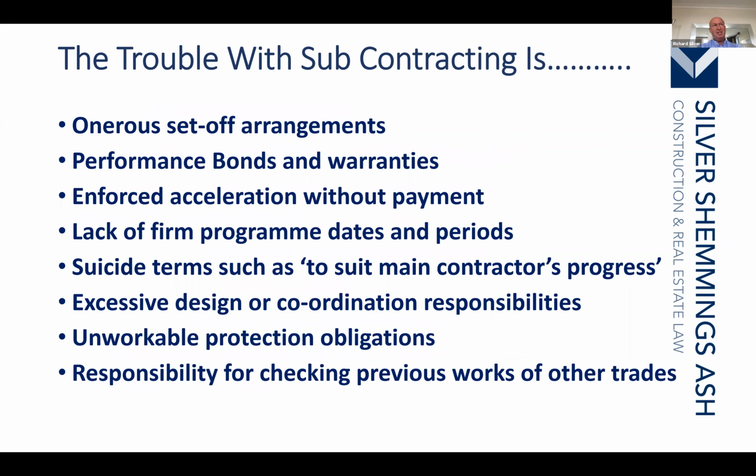Set-off arrangements. This is where a party can seek to charge you for costs that it incurs, but it could do it on the basis of forecast cost. So what our forecast would be, so we can set off our cost for your failure as forecasted. So you're the ground workers, the job's far from complete, they forecast that the ultimate job will finish 20 weeks late, and therefore they're charging you 20 weeks of liquidated damages that are forecast and have not yet even been incurred.